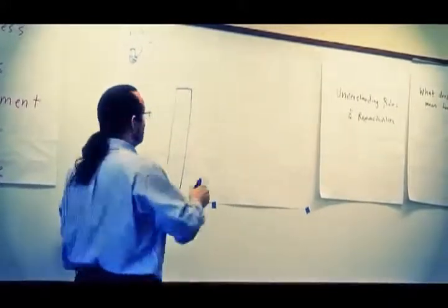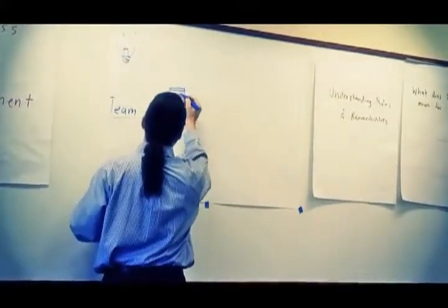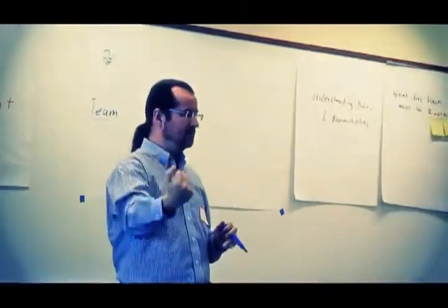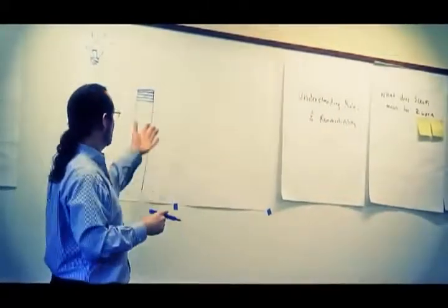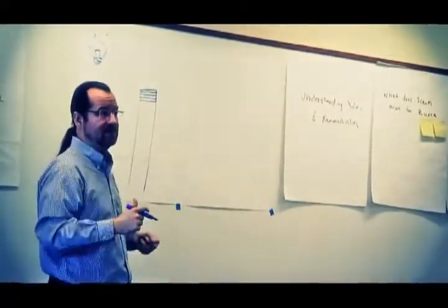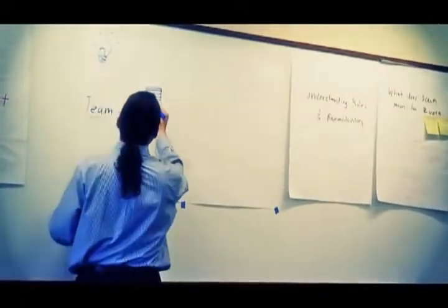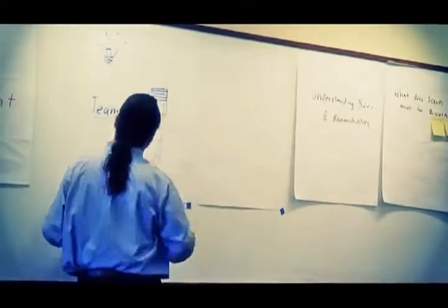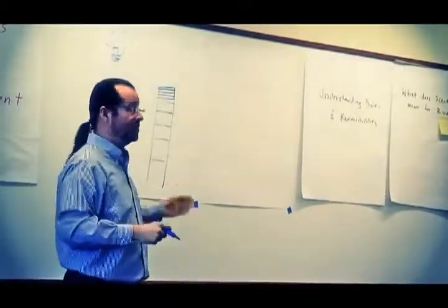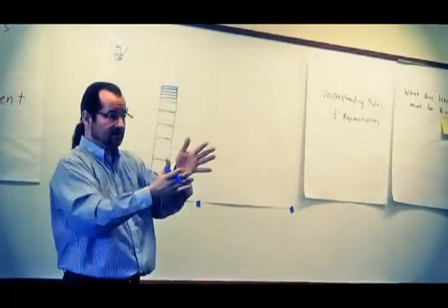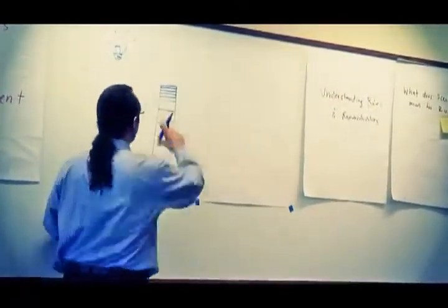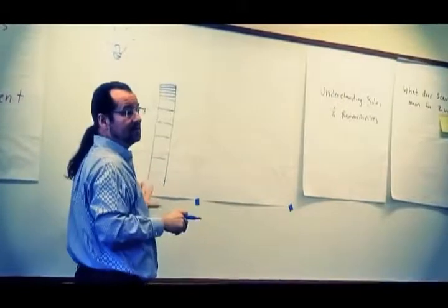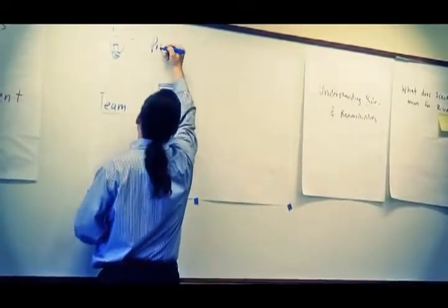Up here at the top, we probably want our stories groomed nice and small, right? They're small, they're well-defined, they have really crisp acceptance criteria on them. We're really ready to give those to the team and have the team understand what they are and work on them and deliver them. Farther down in this stack, our stories might start to get bigger, less well-defined. That's okay, so long as by the time they rise to the top, we've broken them down and got them all small and well understood. We call this ordered collection of our user stories the product backlog.